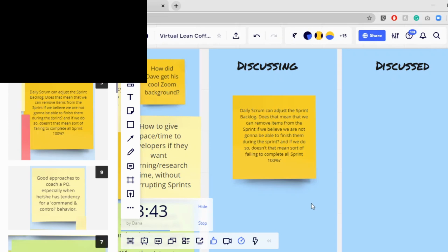Okay. My thoughts are, for example, sometimes it's really hard to make a goal when all the tasks are so different from each other, and you just can't have one idea about a goal when one task is documentation and the other one is, I don't know, a UI feature, and then the other one is in the back end, and you can't have one specific goal. So if you keep having, in every sprint, some tasks that you're not going to be able to completely finish, then first of all, your velocity is less than what you were counting on in sprint planning every time. So you should really think about not putting so many items in your next sprint planning, maybe.